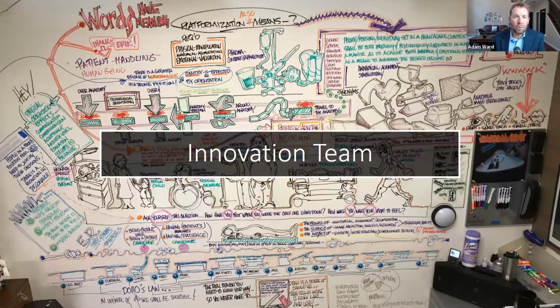The next would be the core team. These are the innovators. In the manufacturing world, we'd call these the engineers, but these are the people that are actually creating what will be around tomorrow. You can see some examples in the background of this slide of new imaging devices or ways patients are taken care of, but they're the ones actually coming up with those. In addition to the core team, there's an extended team. The extended team is on the project between 20 and 50% of the time. The core team and the leader, 50 to 100% of the time.